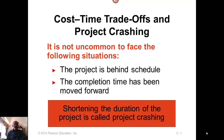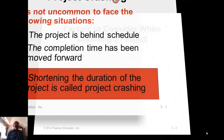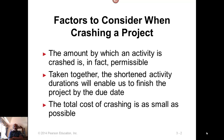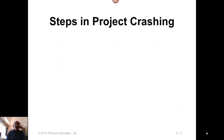Shortening the duration of the project is called project crashing. The factors to consider are: the amount by which an activity must be crashed, how much crashing can be done for each activity, whether the shortened activity durations will enable us to complete the project within the due date, and that the total cost of crashing must be as small as possible.